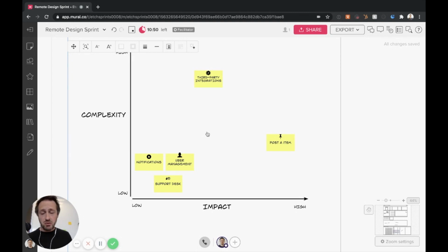Ideally, you don't want to launch with everything. The problem with that is creating everything in a very waterfall process means that you're not actually providing value to customers until 6, 12 months, maybe longer. If you start sharing those critical features early on, then users are getting value from it. You're coming to the market earlier. You can start getting some return. So that's why we plot them on this axis.